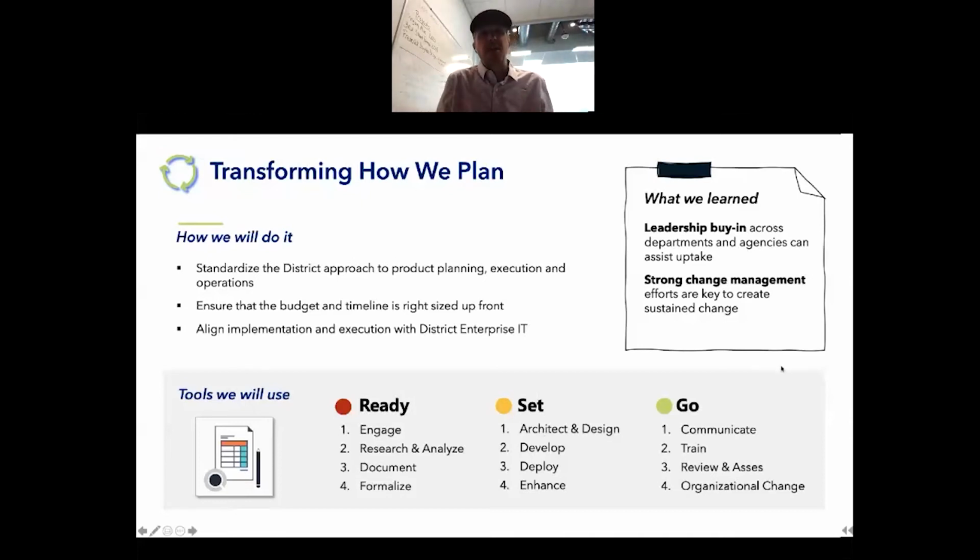That information we then bring into Tableau, and that's our decision-making tool. And I would be remiss not to say that our performance team at DDOT is amazing and they can do anything. So we've created this tool which takes all the information that we just talked about in the previous slide: the PCI, the number of service requests that have come in regarding the street from residents, right? The age of the service request, any ADA issues that might be hanging out there. And we put this in a way that we can sort and filter by ward and look at different combinations. We get a dollar amount.